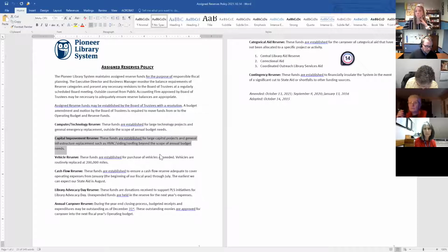If you put together that spreadsheet and let's say you look out like 5 years and you say this is going to be how much it's going to cost to replace all this stuff, and then you look at the amount that you're putting in your capital improvement reserve fund and you realize that you are under what you are supposed to have in that fund in order to afford all these things, it means that we're going to have to look budget wise to figure out how are we going to fund these various projects.